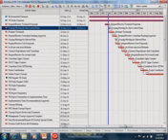Because there are so many times when you're focusing only on the critical activities and you're not realizing that there's some other activity that is one day away from being on the critical path that you're not focusing your attention on, right? So you do have the ability to look at, in addition to your most critical activities, your second most critical activities and your third most critical activities, et cetera.